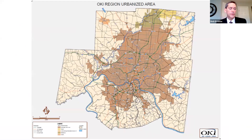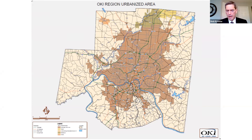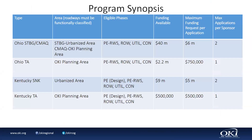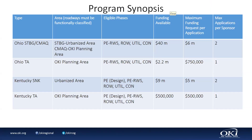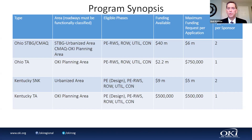Here is a map showing the urbanized area — anything in brown, as well as the Oxford area and the Hamilton-Middletown area. There's a portion that's part of the Dayton urbanized area up in Warren County (yellowish color) — we don't accept STBG applications for that area; those applicants need to go to the Dayton NPO. On cost estimates: provide them in current-year dollars with a 10% contingency. We will apply the inflation factor using ODOT and/or KYTC's inflation factor information.